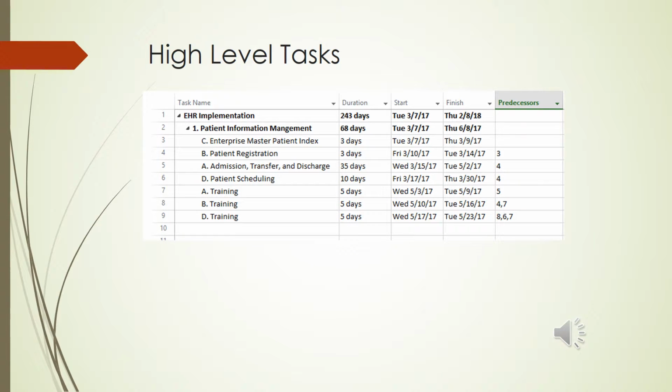What we can assume is that the training sessions cannot overlap, as the individual cannot be attending 2 different training sessions within that organization at the same given time. Also, the individual will not be interfered with by other subtasks that happen to start around the same day or at the same time, thus preventing the training sessions from overlapping.